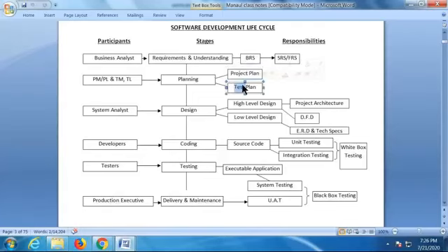There are two plans we have. The developer plan is different; the testing team plan is entirely different. The developers' lead will prepare their own plan. Your test team lead will also be there for you guys. You are working under a team lead, and he will prepare one plan for you. The test plan explains what to test, when to test, who will test, how to test.